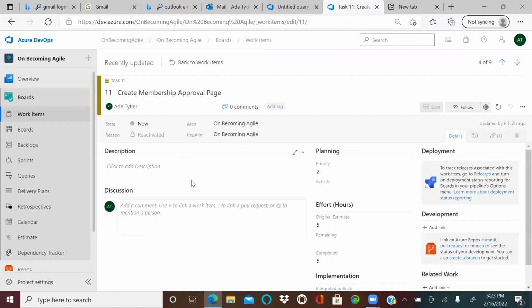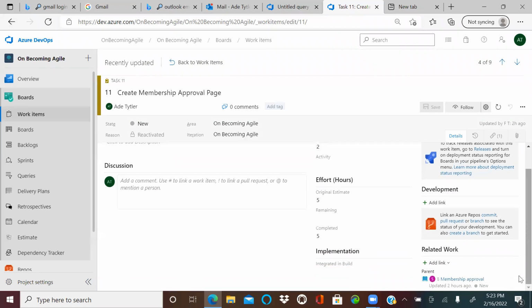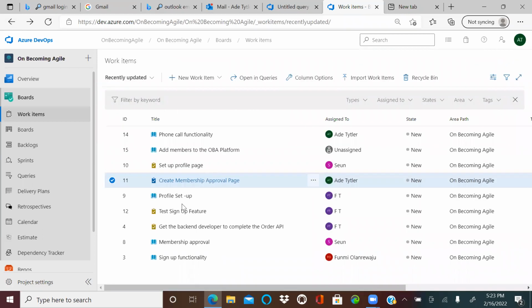So these are tasks. Usually they shouldn't stand alone. Your tasks should have a parent, like a story that is already attached. Of course, the guys do not just work off a task. The task is associated to a story. If you have questions on that, I'll get there when I'm done.